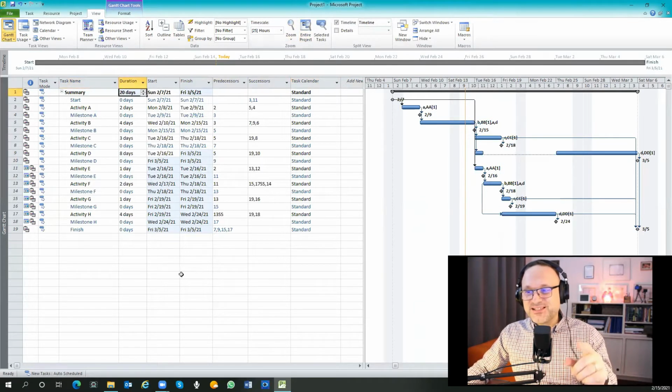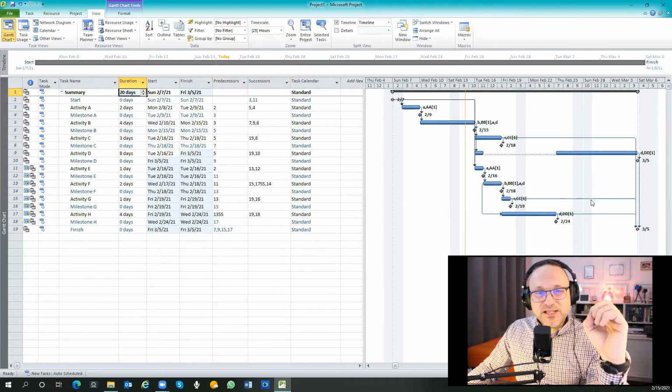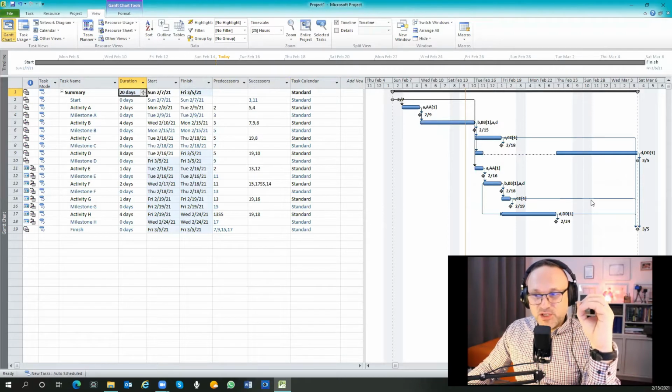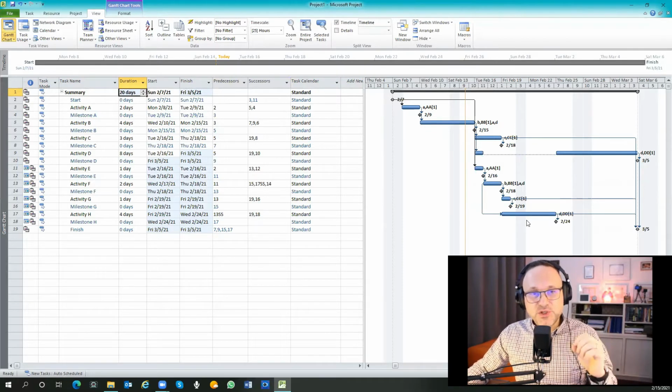The project is shifted from 14 days to 20 days. So those are the real project things. Those are the tricks you must use. The mistake which most schedulers and project managers make is that they just plan the Gantt chart, they don't assign the resources, so their Gantt charts are not realistic.